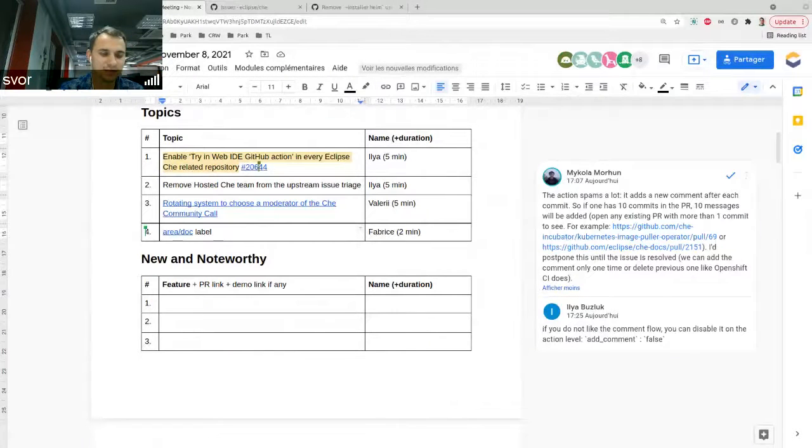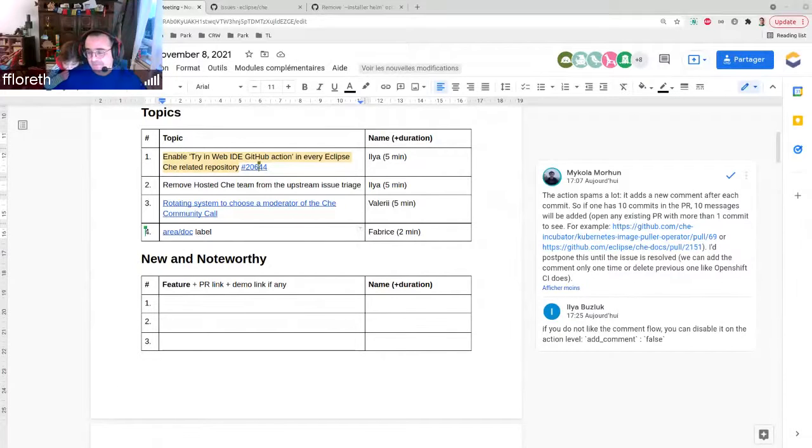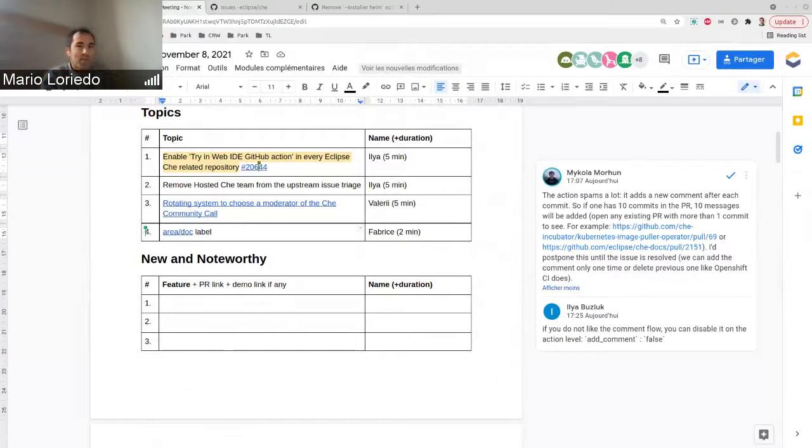Yes, but to be clear, it's not about attending all the stand-ups of all the teams. If we have two writers and 8 teams, it means each writer has to go to 4 stand-ups in a day. So that's a lot. If you want to do that, you can, but I would not suggest that. The QE team doesn't have a QE engineer on every team either. They are just starting with one.